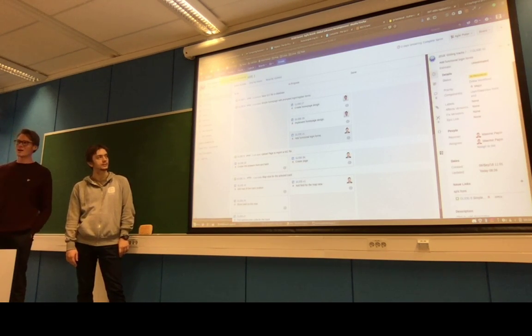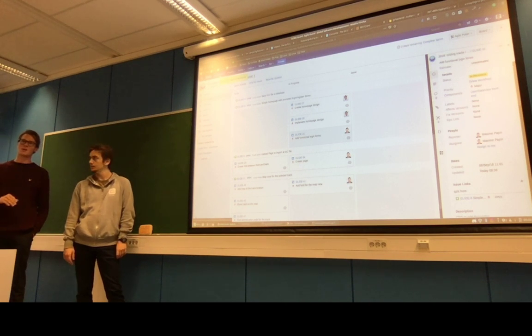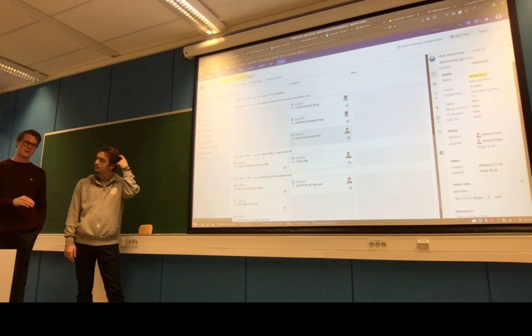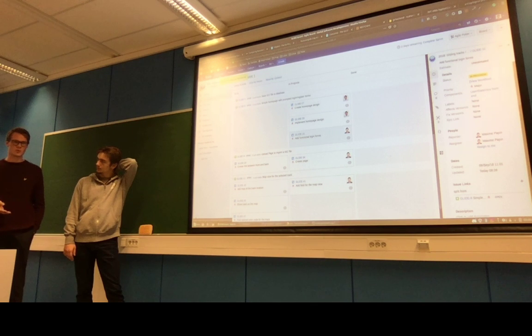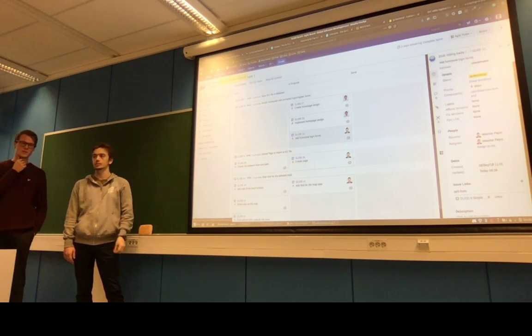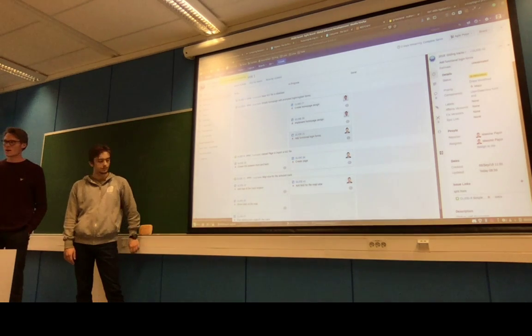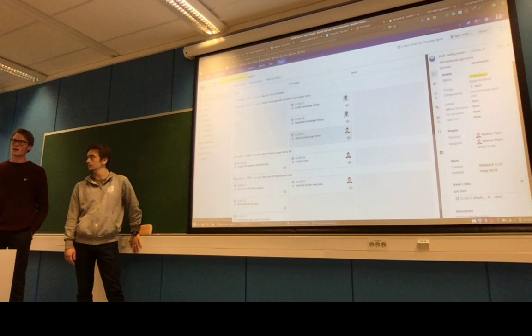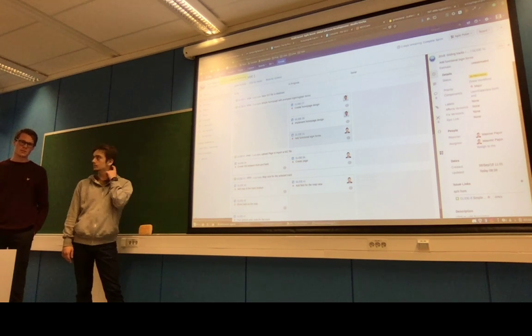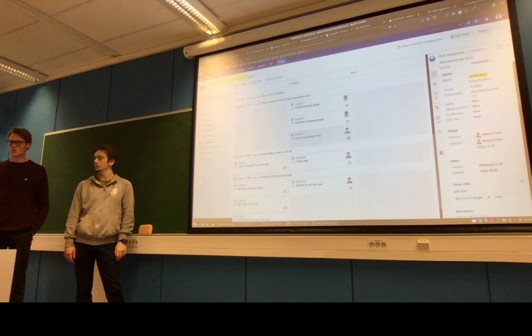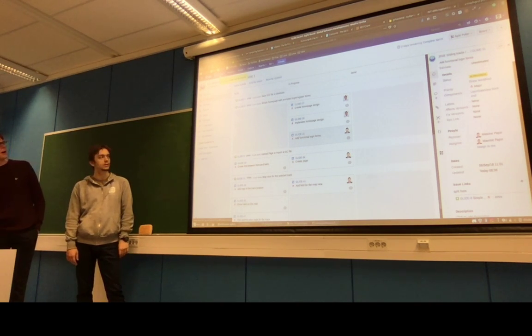I don't think it's as much about us poorly estimating as just team effort putting in the story points. So we went the route with Marius's brother doing 4 hours per story point, kind of. We said to dedicate 1 day per week per member, so that's 8 story points per week. And since this was kind of a bootstrap sprint, we had 8 story points on this.